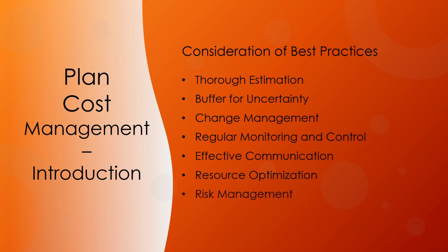Project managers identify potential risks that could impact costs and develop strategies to lessen them. This involves setting aside contingency reserves or developing contingency plans. When working with vendors, project managers negotiate contracts that clearly define cost expectations, deliverables, and potential penalties for exceeding budget limits.